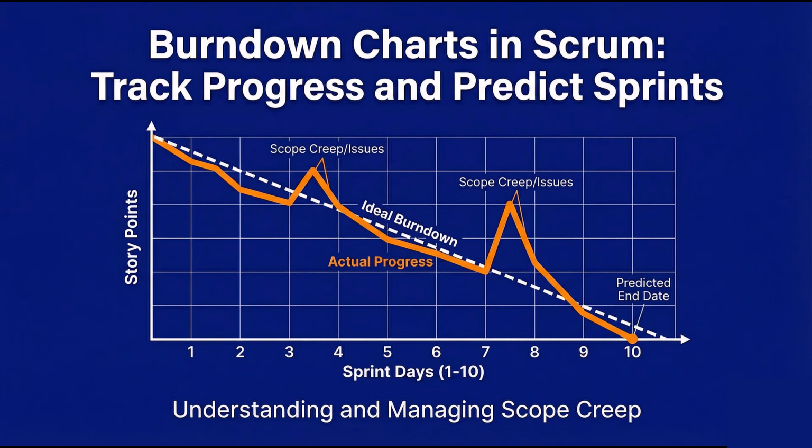Retrospective: review all mid-sprint additions. Establish a clear protocol. New urgent work means something else must be removed. Educate stakeholders on sprint sanctity. At the tax administration, we had a director who kept adding quick fixes mid-sprint. After showing him this pattern and the impact on velocity, he agreed to hold requests until the next sprint planning.